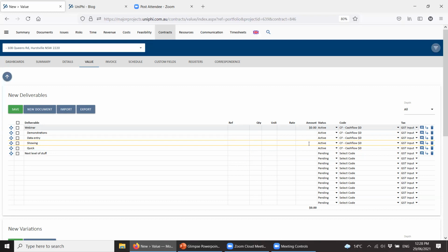But at least you've been given a price by an architect for 4 phases. You've only let the first one. You still know what they quoted for those other 3 phases, but you're not committing that whole lot to the contract value as a committed value straight away in the cost report.